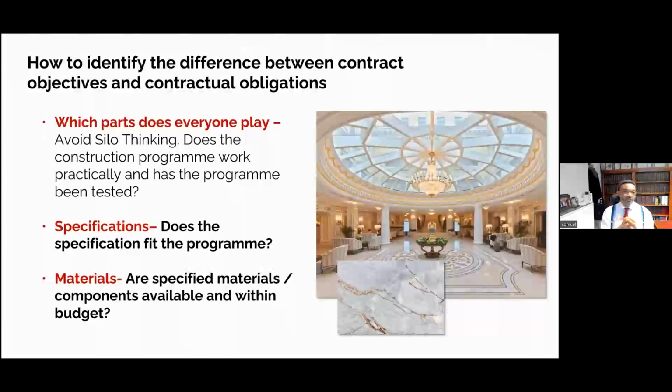Now, another example that hits me in the course of trying to bring this point home is, if you like, a substantial residential project where marbles have been specified, some marbles coming from Italy. Now, look at the supply chain, look at the delivery period, and then look at the program time that's been allocated for it. Do you have sufficient time to procure and to get delivery and then to fit?